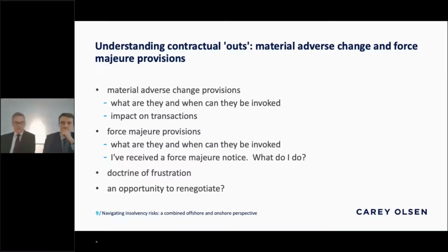So the key points for you to consider if you receive one of these notices are, A, confirm the notice is validly given in accordance with the contract. Pay particular attention to the format of the notice and the time within which the notice must be given, as these are often specified in the agreements. You'll need to get comfortable that the invoking party has provided adequate proof that the facts of the claim come within the force majeure provision and the definition has been satisfied.